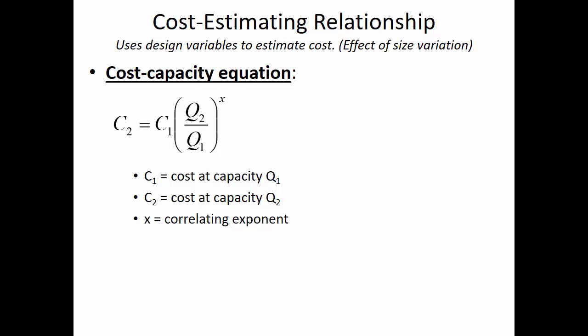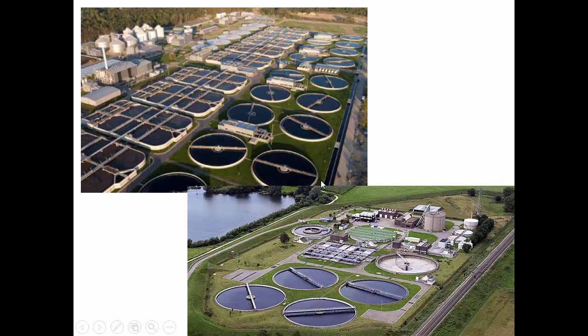When we have a difference in size, sometimes there are non-linearities with respect to price. What I mean by that is if you're constructing a really large wastewater treatment plant, you maybe get a different price per clarifier than the smaller community did. Oftentimes if you're going to buy 12 of something, you get a cheaper price per item than if you're buying 1 or 2 or 3. I've mentioned that you can walk into Lowe's and see that on the shelf, where they have contractor prices for some items.